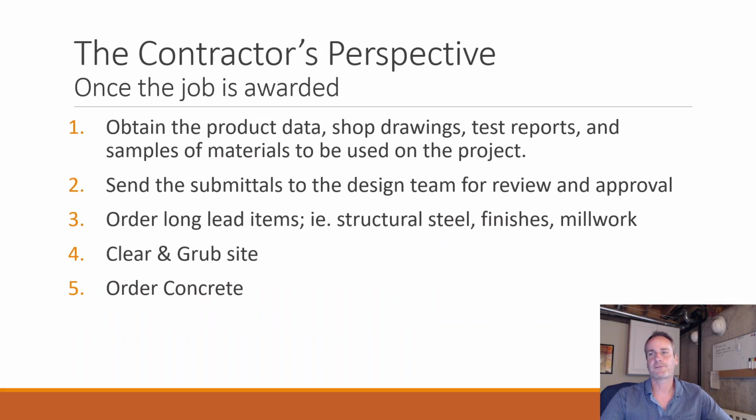From a contractor's perspective, after they get the award, after their bid was accepted, what does it look like? What do they need to do? They're looking at getting the product data, shop drawings, test reports, and samples of materials to be used on the project.